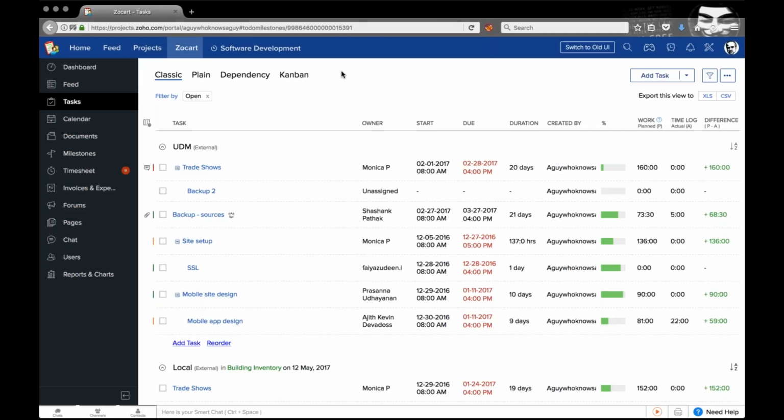Make sure that when you take up a project, you break the project up into major phases or major deliverables, which are milestones. And going further, you can break those milestones down into sub-phases or task lists. Task lists can be used as sub-phases or as a means of grouping relevant tasks together. And further, you can break those task lists down into individual tasks.